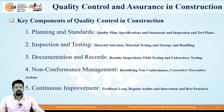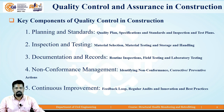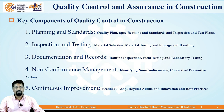The next point is non-conformance management. Identifying the non-conformance and taking corrective and preventive action are the sub-stages of non-conformance management. Whatever detected non-conformity is found must be rectified within the time — this is called an NC at site. Clearing an NC is a very difficult task for engineers and the execution team within the schedule. The quality control department insists on clarifying this non-conformity within time and does not allow work to proceed further until resolved.